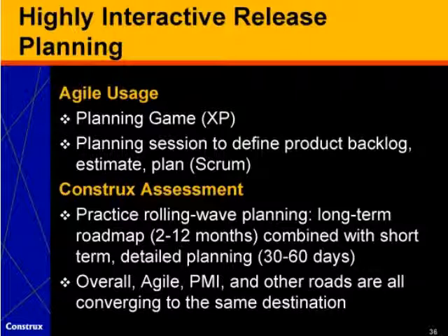The Agile world, Project Management Institute, and other roads are all converging to the same destination, which is some kind of coarse-grain, large-scale planning for general direction, and then leaving your fine-grained detailed planning for a fairly short planning horizon, something like 30 days. And I think this has clearly emerged as another industry best practice.